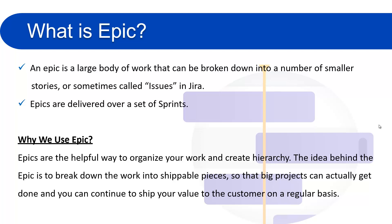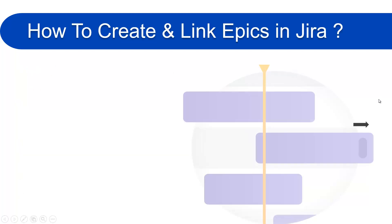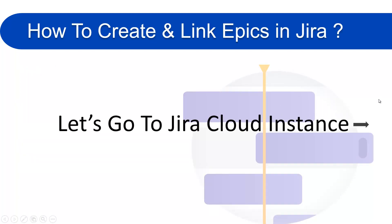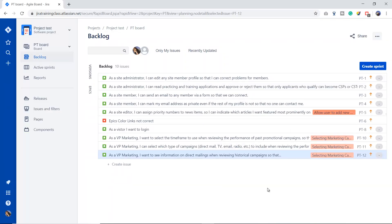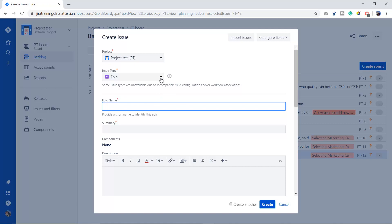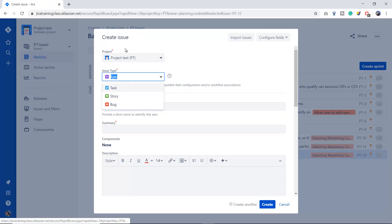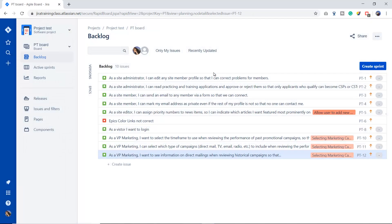Now I've told you about epics and why we use epics. Let's move forward to see how we can create epics in Jira. We have to go to our Jira cloud instance. This is our cloud instance and this is the backlog page. We have two ways of creating epics in Jira. The first one is to simply click the plus icon and choose the issue type of epic from the list — that is the first way.